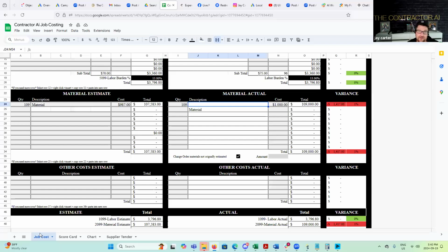You've incentivized that. Now I'm going to turn around and go to my supplier and say, hey, Mr. Supplier, I want to be a really great customer of yours. If I pay my bill within 15 days, will you give me 2% back as a rebate? Oh, hell yeah. Let me shake your hand, rub your back. That's exactly what we want. Perfect. I have that deal set with every single supplier I have. I have 25 in my Rolodex that we use regularly. That's your first thing.